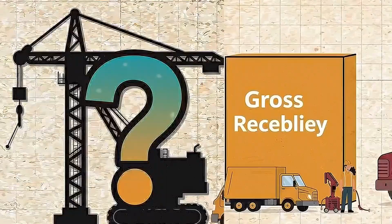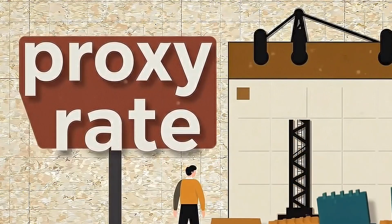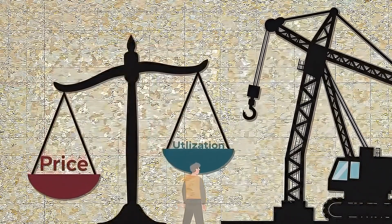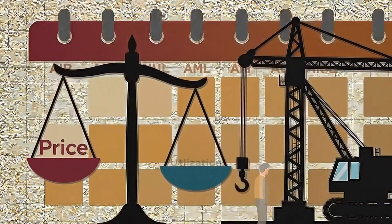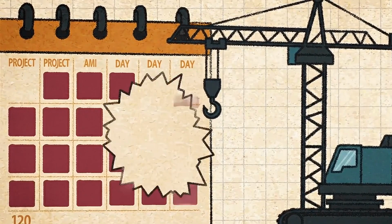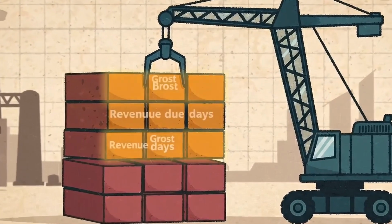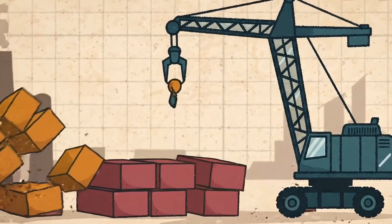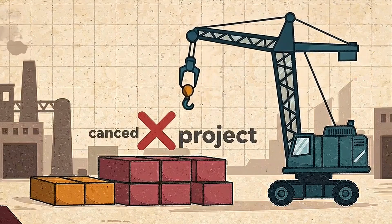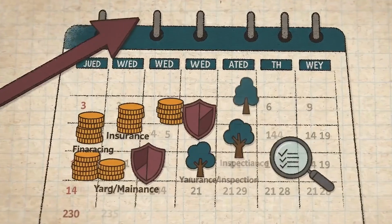In Indianapolis, that network problem had another layer. The crane and its support loads did not move through empty land. They moved through a regulated road system. So even before the construction schedule starts, the transport schedule has rules of its own. Indiana requires oversize or overweight permits once vehicles exceed defined limits for height, width, length, or gross weight. For especially large movements, the state also has superload rules that can add escort and timing requirements. We do not know that every one of the 17 loads in the featured crane package crossed those superload thresholds. We do not need to assume it.